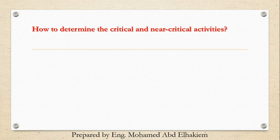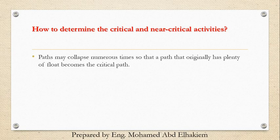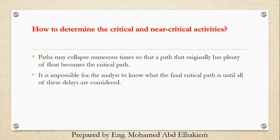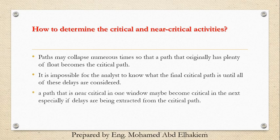How to determine the critical and near-critical activities? Paths may collapse numerous times so that a path that originally has plenty of float becomes the critical path. It is impossible for the analyst to know what the final critical path is until all of these delays are considered. A path that is near-critical in one window may become critical in the next, especially if delays are being extracted from the critical path.